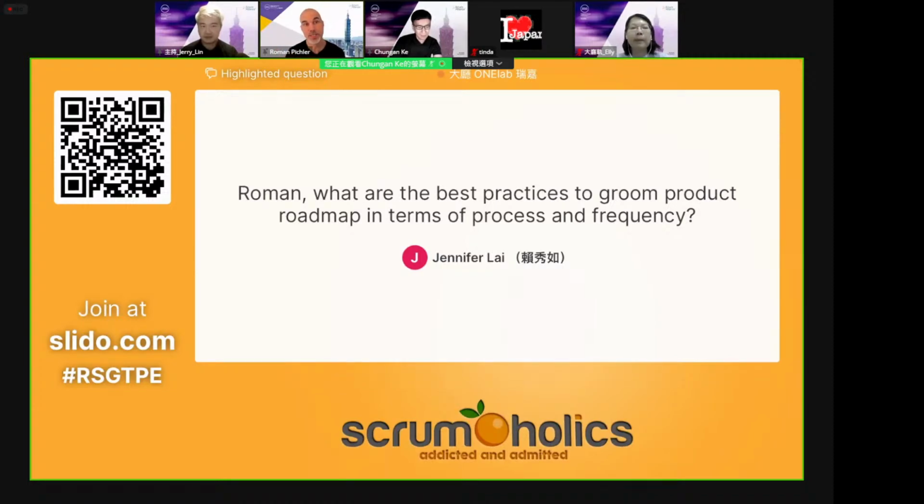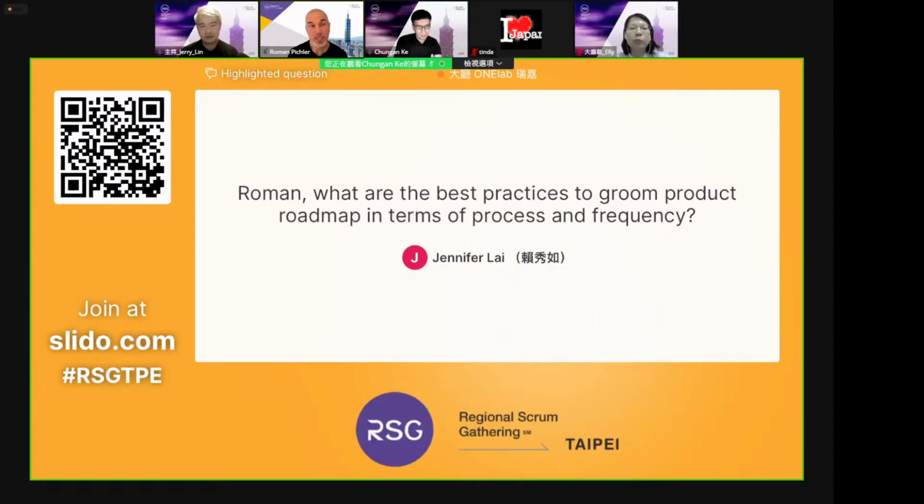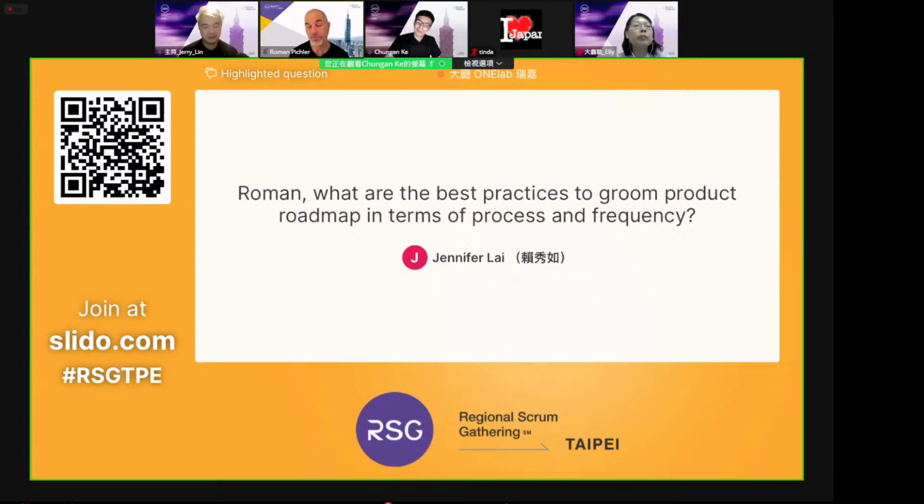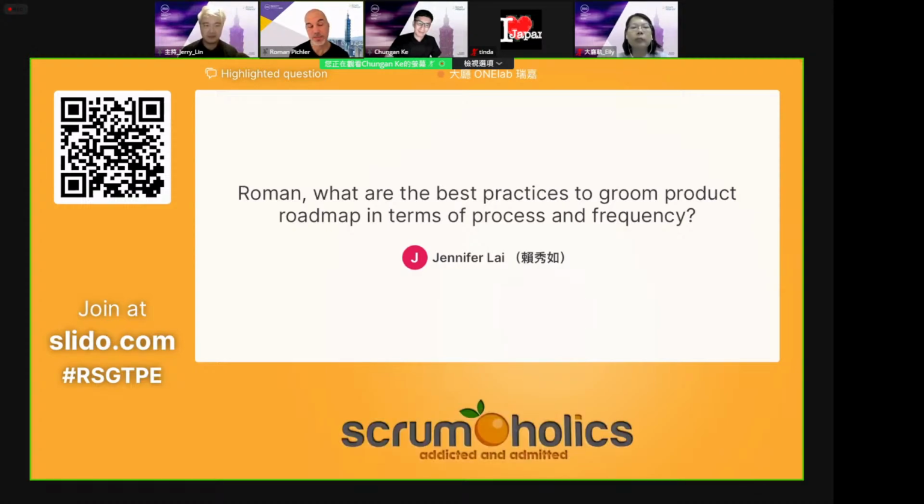By product strategy, I mean: has the target group or market segment changed? Has the product's value proposition changed? Have any standout features changed? Have any overarching business goals changed? Those are the three factors I typically look at. As a final comment, I like to combine product roadmap and strategy reviews, because you need the same people and it's a similar review frequency, so you might as well combine those two meetings. That saves you scheduling yet another meeting. So maybe something you want to consider.